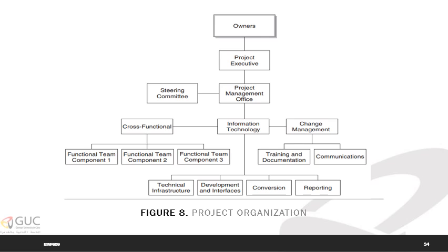The development team will work to develop or modify the software to meet the goals of the system. This team will vary in size depending on the decisions to modify or not modify the system. The conversion team is very important. Conversion needs staff having knowledge about the legacy system and the new ERP system to convert the legacy data to the new system. Conversion is usually the most complex and time-consuming activity within the project, also known as the critical path. Retrieving data and reporting information out of the new system has a steep learning curve.